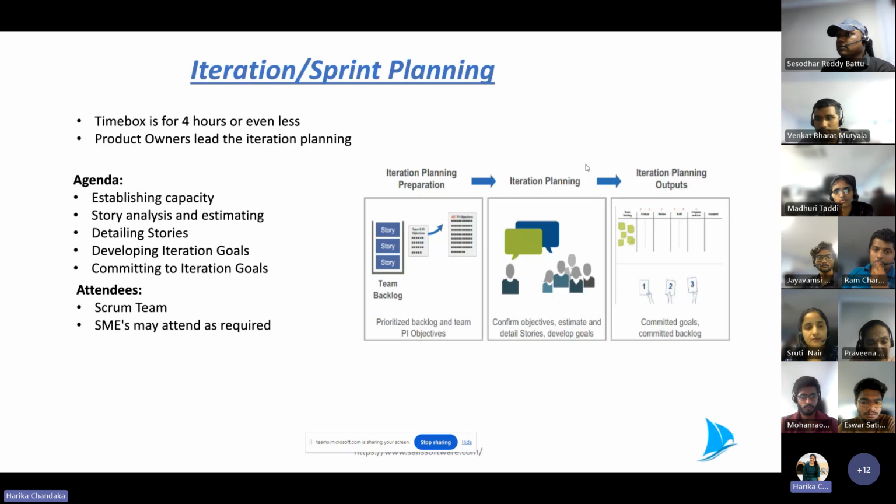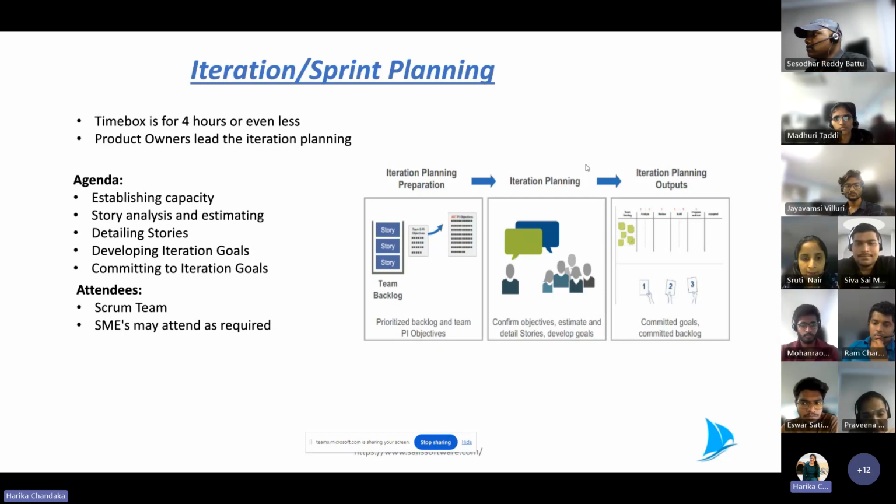And in such cases, how do we give the capacities? Say suppose it's a 2 week sprint, and we have 5 team members, and we usually value the efforts in story points. I hope this is a well-known thing to most of you. Per head, if we assume it's 8 story points, the capacity is 5 into 8, 40 story points.